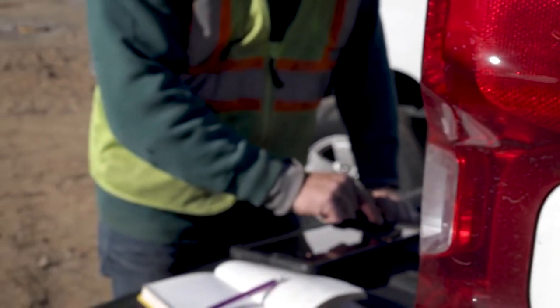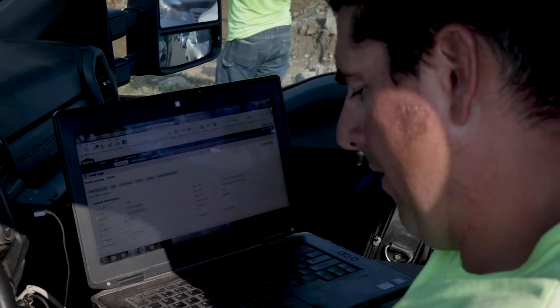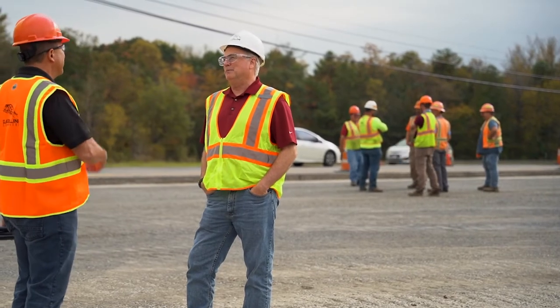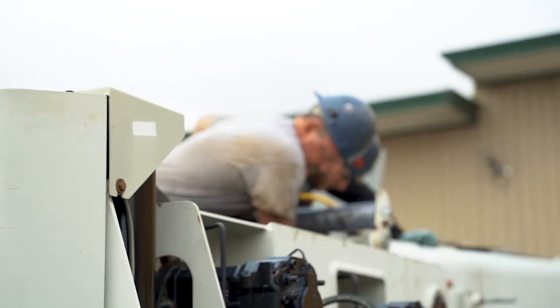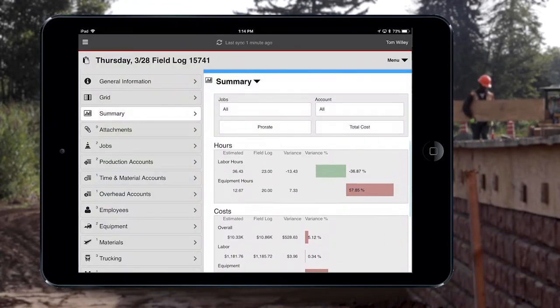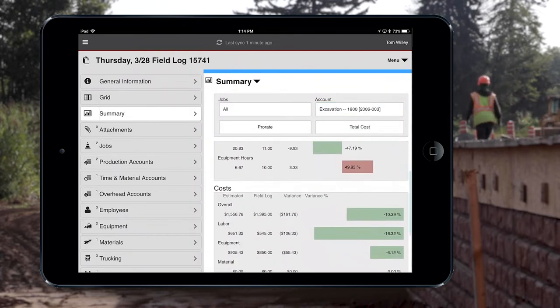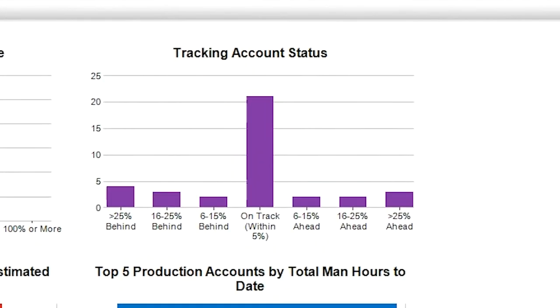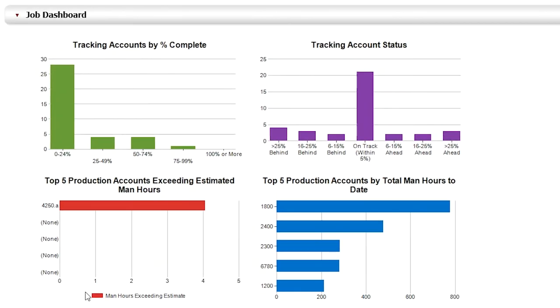The foreman submits it, the superintendent does an initial review, and the project manager does a final review and approval. The most effective thing I find with Track is knowing where your productions go — you get a nice output of performance versus budget and can make decisions in the field based on that. I think it's absolutely critical: if you don't know your cost, you don't know anything and can't make decisions. We're running a business, so you need to know early on if something's going bad or going good.